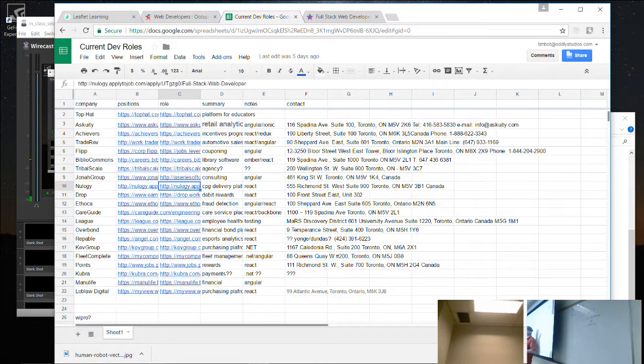And they're always trying to work their way through this burn down, which is why they have that daily Scrum meeting where they basically just check in. It's very short usually. It's like 15 minutes. And someone just says, oh, here's where I'm at on that use case scenario. Somebody else says, oh, I'm free, you should give me something. And they take something from the backlog. And they actually chart it. They chart it like an actual burn down.